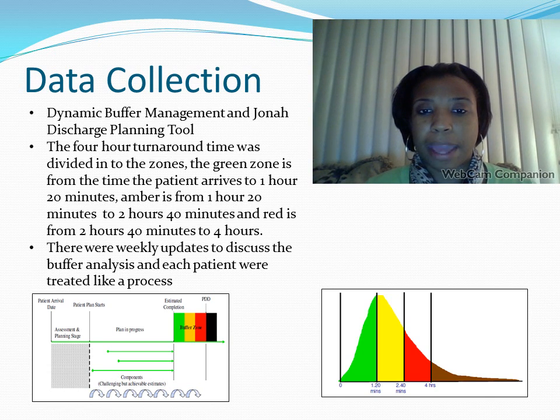Using dynamic buffer management, the buffer has three parts, also known as zones. The zones are indicated by the colors green, amber, and red, and the team would deploy different activities according to how far the buffer has been used up, to make sure that you meet the deadline.